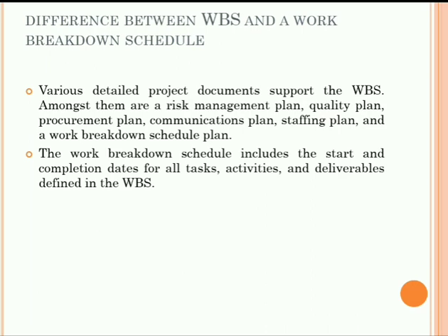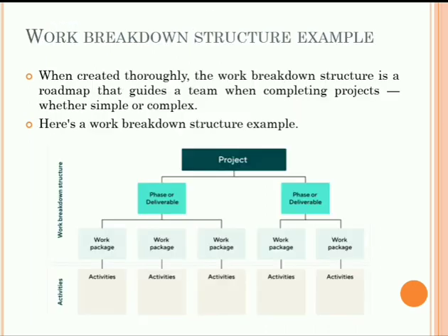Next element regarding the work breakdown structure we can consider is work packages. Here, as defined by the Project Management Institute in its Project Management Body of Knowledge book, a work package is the lowest level of the work breakdown structure. That's because a work package is a group of related tasks that are small enough to be assigned to a team member or a department. As a project manager, you can estimate the cost and duration of these work packages, which makes them an essential work breakdown element.